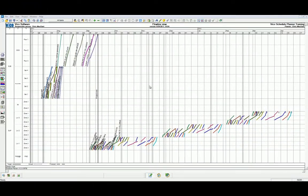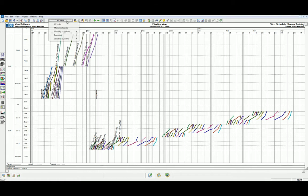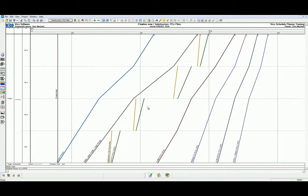Let's get started and isolate the PCs and pile caps view. In the optimization process, we try not to split tasks straight away. This is because if you create a finish to start link between tasks, it automatically replicates the logic in a location-based scheduling system. But if you split tasks and then create logic, you'll have to recreate logic between all the parts. This becomes unmanageable and may become risky during implementation.